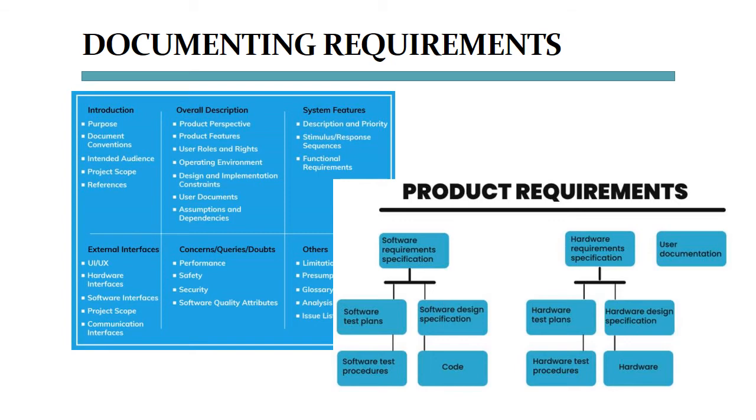All of these will have to be addressed and later on managed, because all of these will have to be testable later on, and the software and hardware requirement trees to the right show exactly that. This is why smart project managers will immediately involve software testers when it comes to collecting and writing requirements for a product. Writing test plans as soon as you write requirements means that your product will be built with attention to quality so that it can later on pass its testing stages.